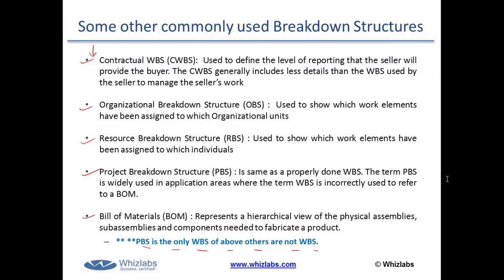See, it goes this way. We are not saying that you do not need to come down to the lower level. We are saying that if it's a complex or a large project, you do the controlling at a higher level. Now, let's say one particular component at a higher level changes. Automatically, you will have to change the components at the lower level. But still, your monitoring and controlling becomes a lot easier because you are controlling less number of elements.